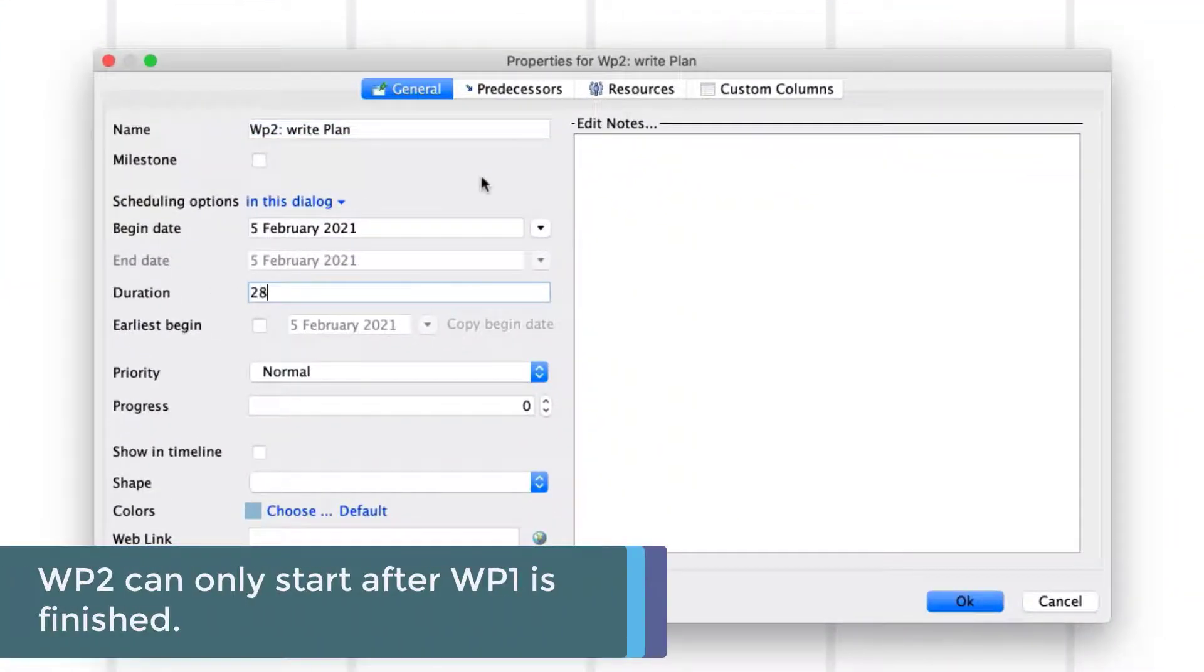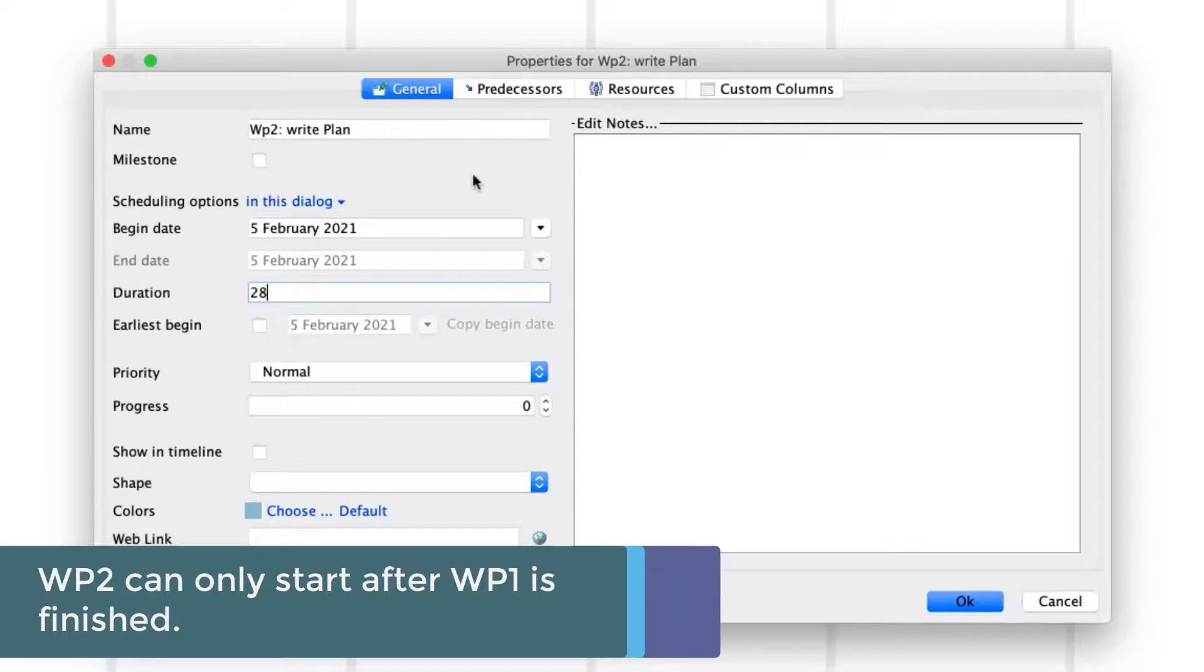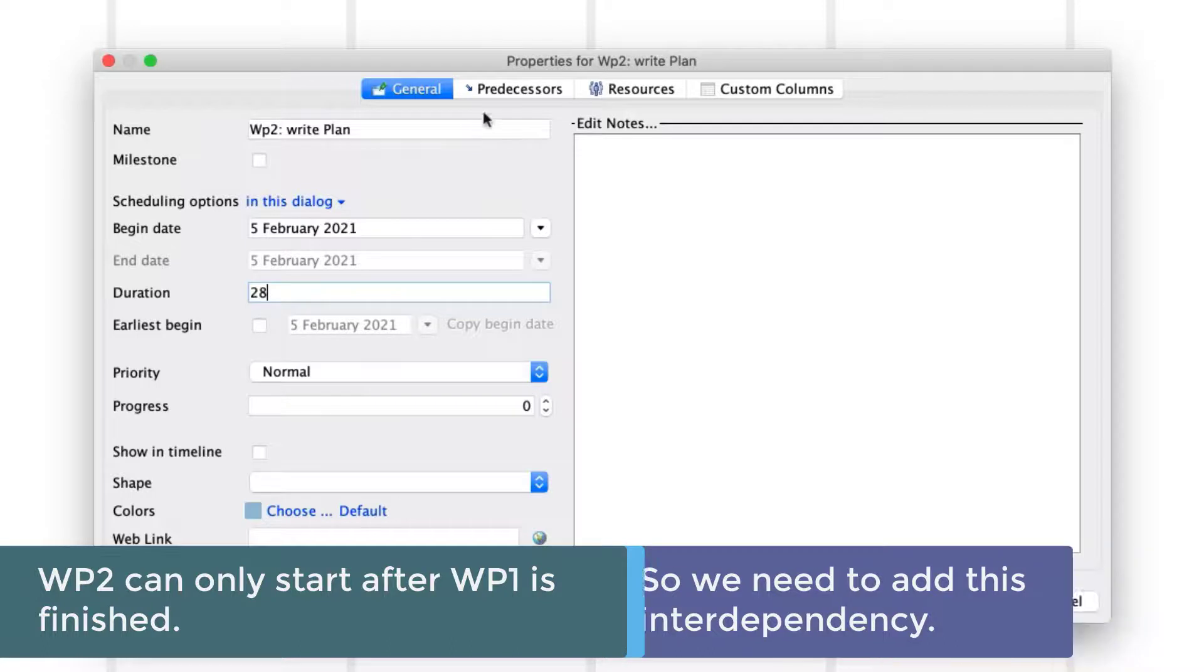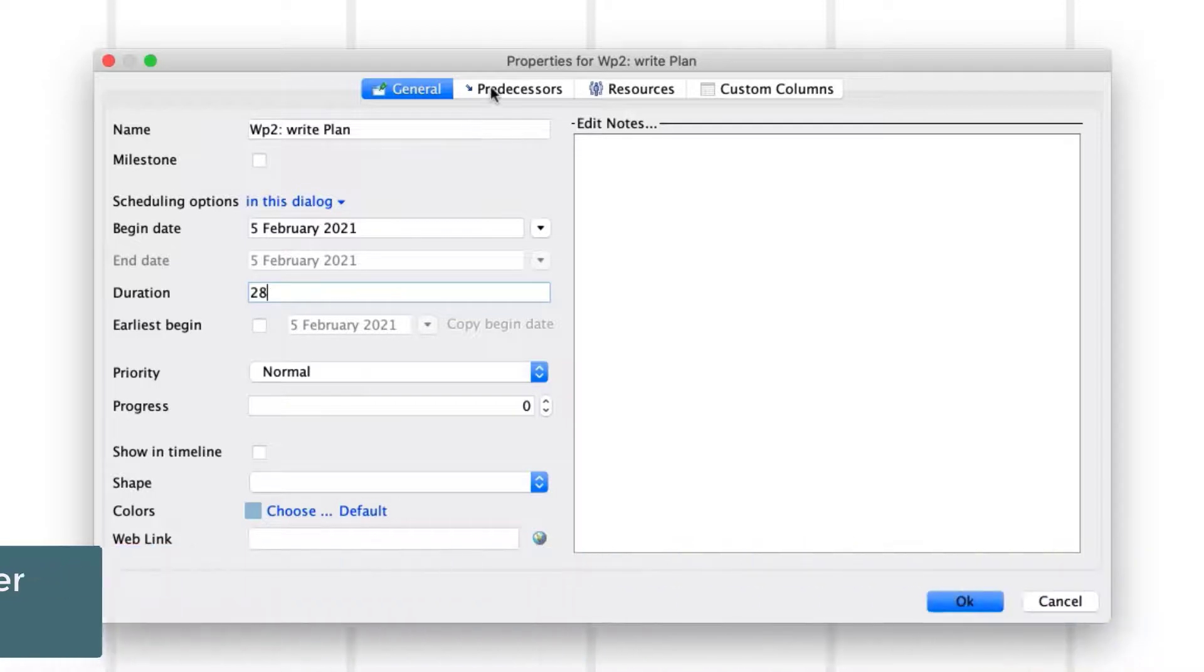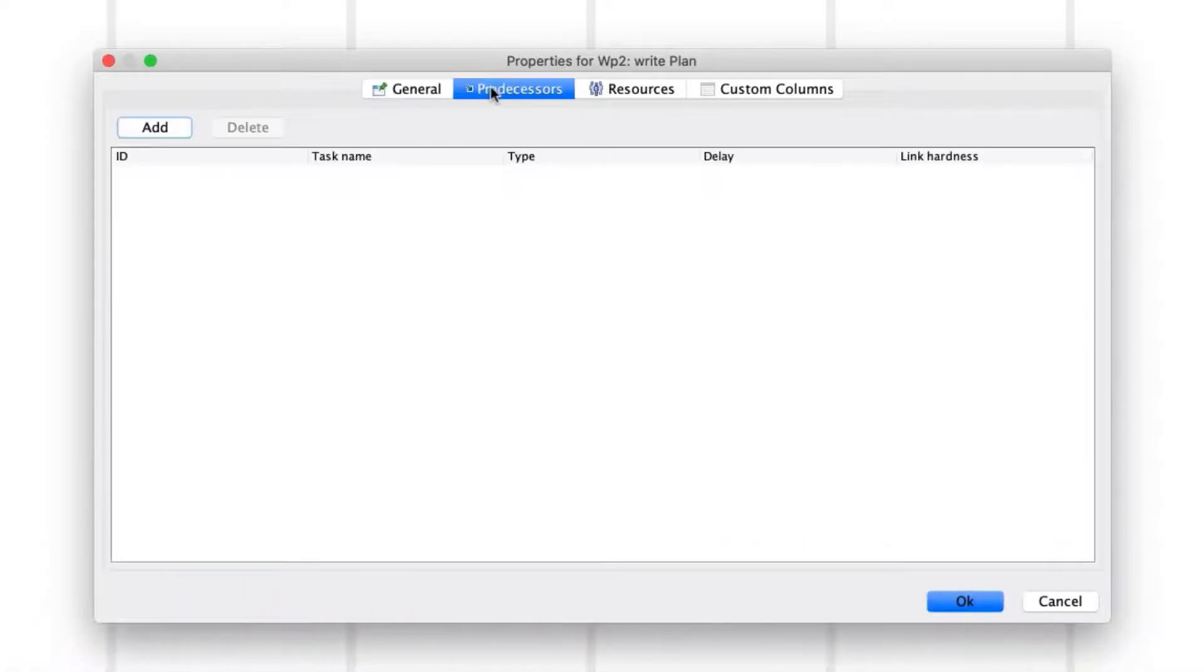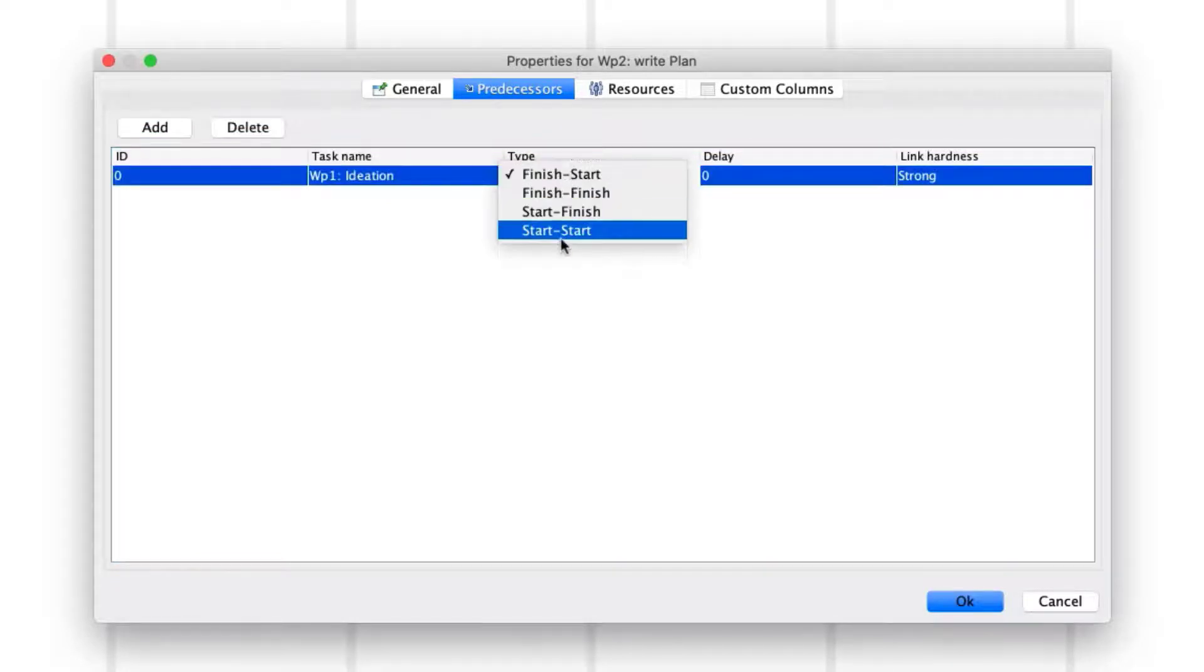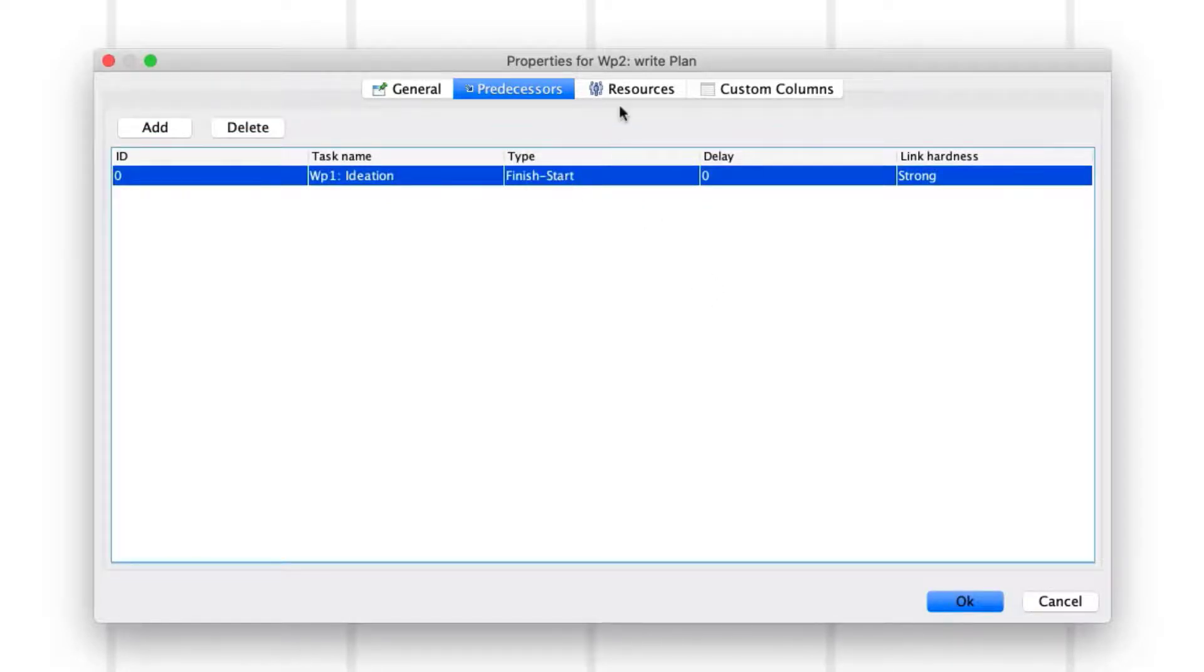As Work Package 2 cannot start until Work Package 1 is finished, we want to add this interdependency to the Gantt chart. To do so, click on the Predecessor tab in the Properties menu and click on Add. Select Work Package 1 as the predecessor and the correct type of interdependency, in this case finish to start.